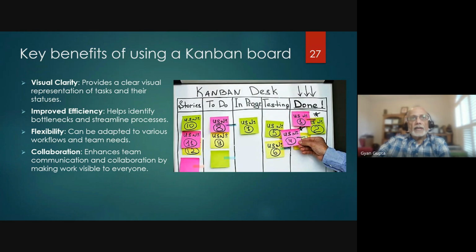And collaboration, right? Now everybody's talking and collaborating. For example, if there are too many tickets getting piled up, I'm using the word ticket or stickies. These are cards, stories, tickets. That's all the same thing, right? If you get too many accumulating in testing, and somebody doesn't have anything to do, and in progress there are only a few things. Hey, you know what? Hey, tester, I think you got too many things in your pile. Can I jump in and start doing testing? I can test, right? So they can jump in. So if they start to see the challenges, they can proactively manage and address that.